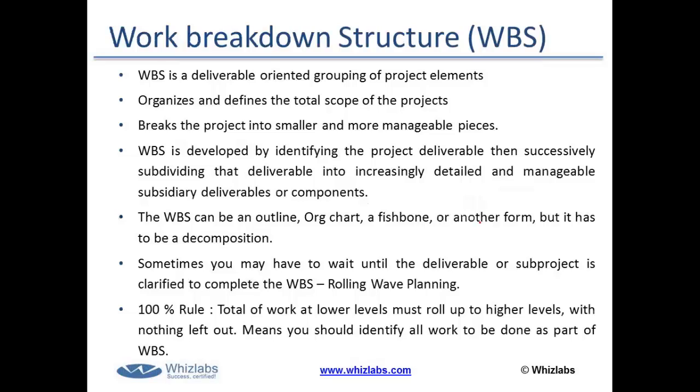If I take up a very simple example, let's say we were talking about a 5-story building construction project. Initially, the major deliverables that we would have are the design of the building. Then in the construction phase, we would have the construction of the building. Then we would have the electrical and plumbing work for the building, right? So these are the major deliverables for the project.